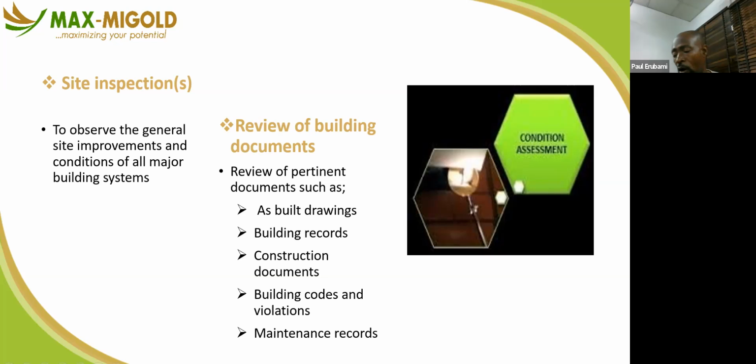I always tell facility managers that there is a difference between your as-built drawing and your engineering drawing or architectural drawing. You get the architectural drawing before the commencement of the project, but your as-built drawing is what you receive after the end of the project, during handover of that project to the project owner.